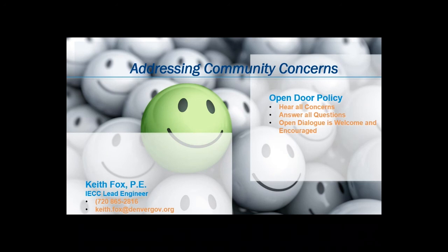Keith, will the commercial ASHRAE prescriptive and commercial ASHRAE performance checklist be completed and submitted by the mechanical subcontractor? What we're asking, because ASHRAE isn't just mechanical, ASHRAE affects all disciplines. So the checklist has the requirements for each of the disciplines on there. The general compliance tab would be stamped by the lead design professional and then be signed by everybody, filled out by a collaboration between the entire design team.